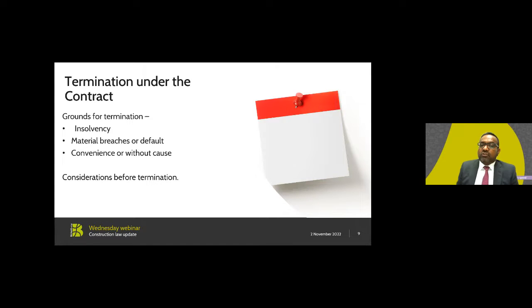That is the reason why construction contracts usually contain events of default, which allow one party to terminate the contract if the other has or is likely to become insolvent. However, the two most common provisions are termination for convenience and termination due to an event of default. The right to terminate by giving an agreed period of notice without any grounds is sometimes called termination for convenience or without cause. This right is useful if a customer no longer requires a product or the contract becomes uneconomic to perform.